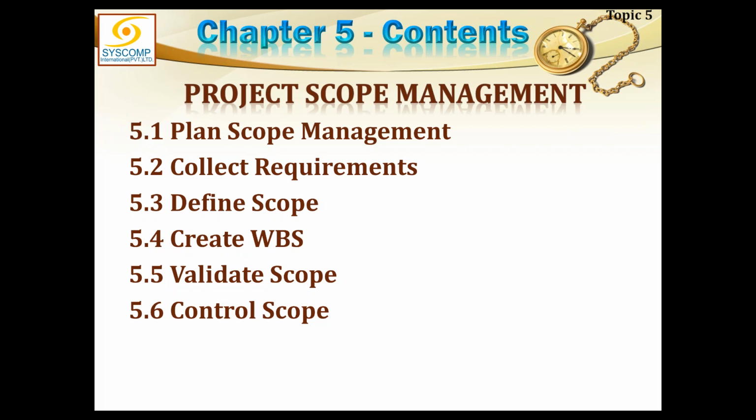All the work required in the process of fulfilling the product requirement, meaning that when we try to produce that product according to the specifications, features and functions given in the product scope, all the work involved to do that would be included in my project scope. And this can include only that work which contributes to the deliverable. Any work which is not contributing to the formation of that deliverable should be out of scope. So within the project scope, all the work and only the work required to be done to create the product of that specification, functions and features. This is my project scope.